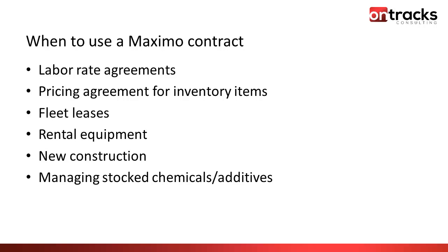Fleet leases and rental equipment were mentioned. For new construction, we have the facility to create payment schedules tied to milestones — when the contract is awarded, when POs are released, when it's completed, and when it's invoiced. So you have the ability to build out a milestone payment schedule for a new building or unit.